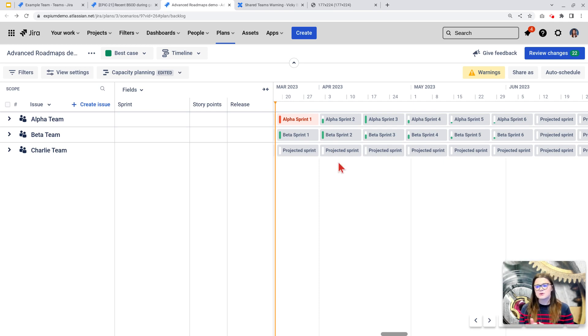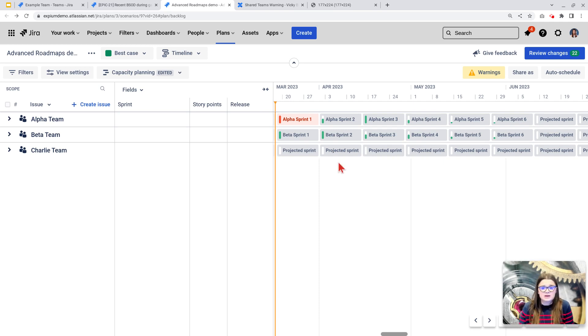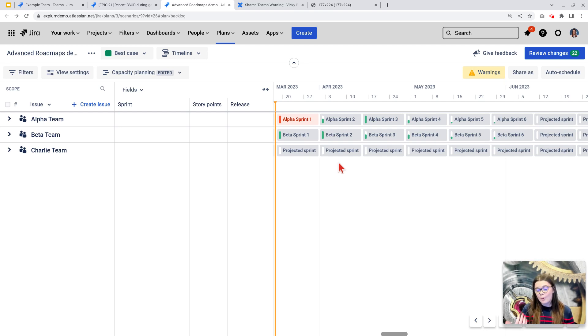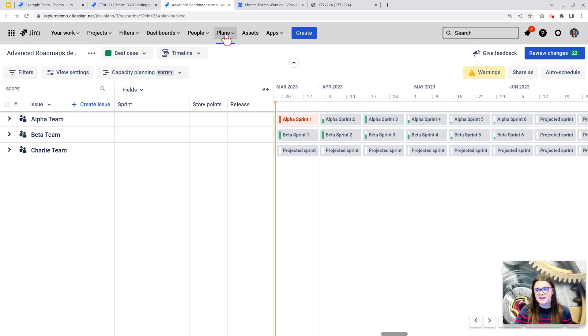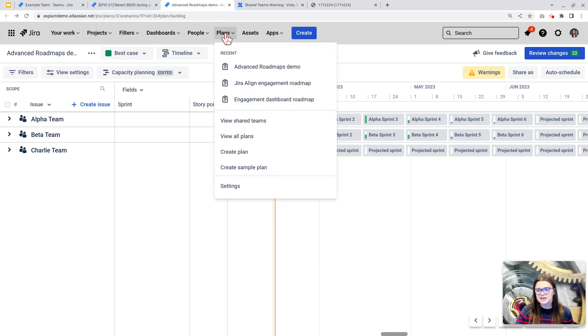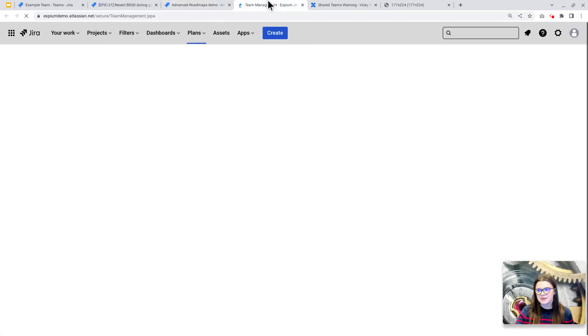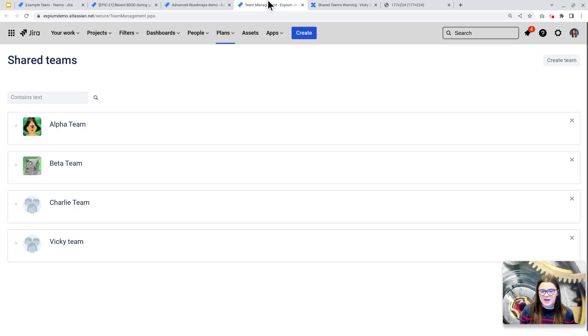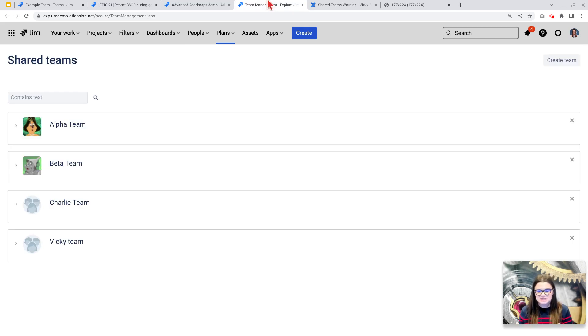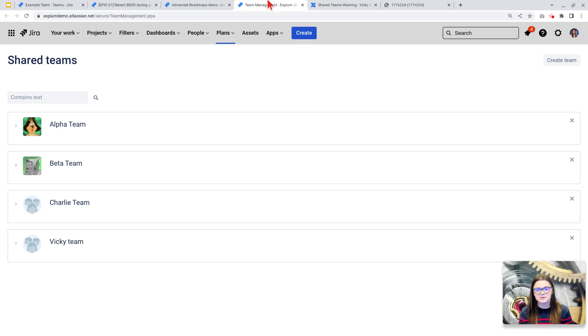Teams in advanced roadmaps can either be plan-specific, meaning that we only interact with them in that specific plan, or they can be shared teams. And a shared team can be accessed under plans. And if you go to view shared teams here, here we have our shared teams in this instance. And a shared team means that you can actually interact with that team value outside of teams.